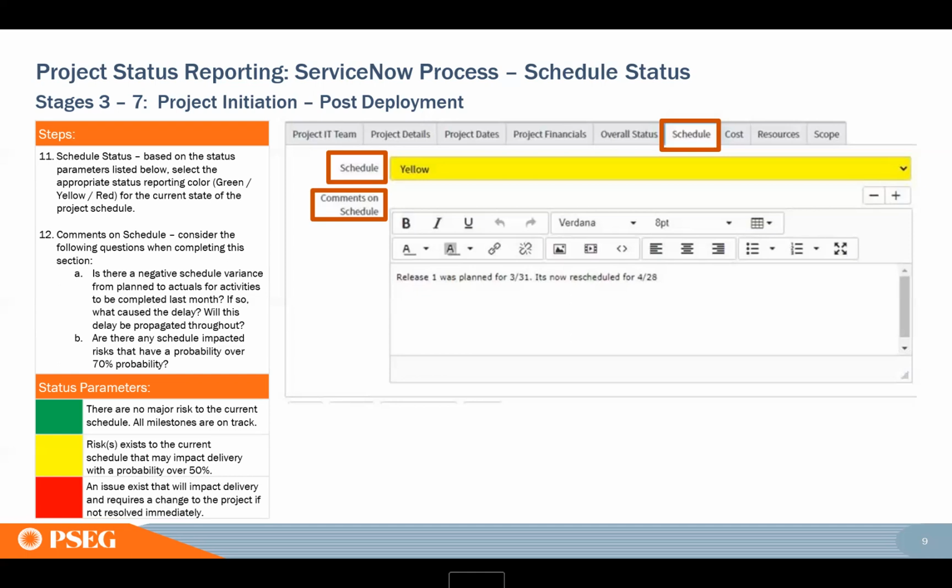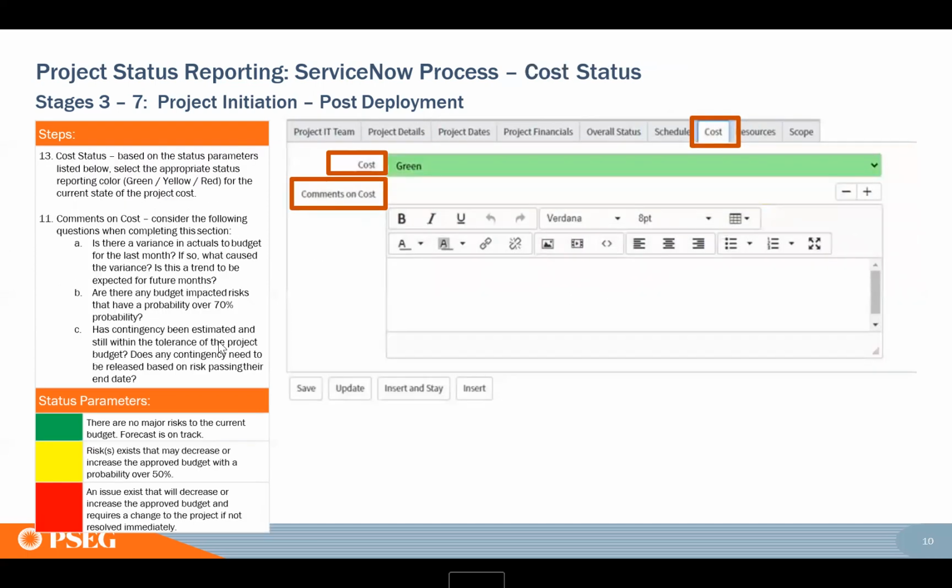If not, here's the things I'm doing as the PM: I'm pursuing either another vendor, or I'm pursuing help from another, whatever it is you're doing to mitigate it or try and get it on track. Make that clear, make clear the dates that you think you'll have an answer as to whether it's going to impact you or not. But that's what I would include in this section. And quite honestly, once you sit in on the portfolio health pre-sessions to review the information, that's the kind of questions you're going to get asked. So I would preemptively put it in the comments.